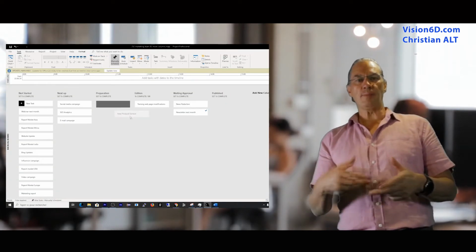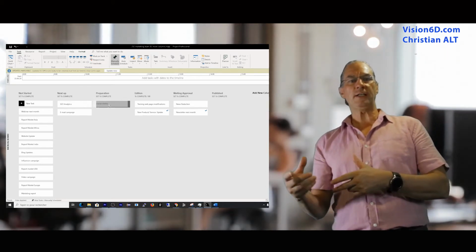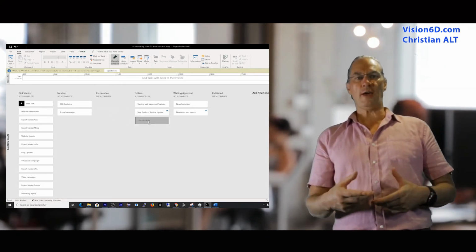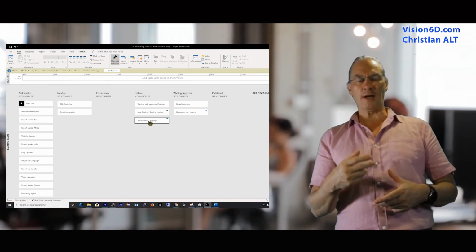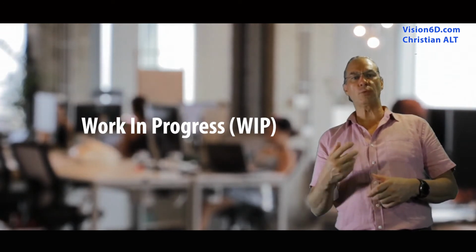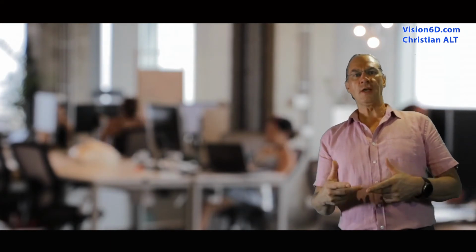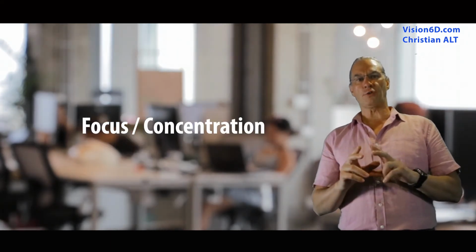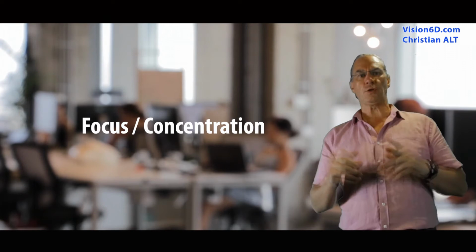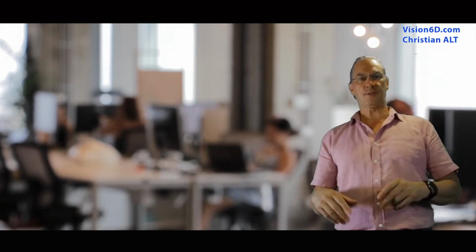We could at that time be in a situation where pictures are not so ready, so he cannot completely edit the article he wants to do. For that, he is allowed now to have 2 items at the same time, so he can go and pull another one. That limitation that we've set to 2 items is what we call work in progress. With this, we avoid a loss of concentration. We keep the people focused. The team can be focused on what they have to do and not be constantly swapping between tasks.